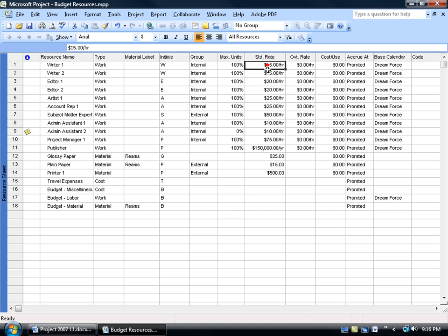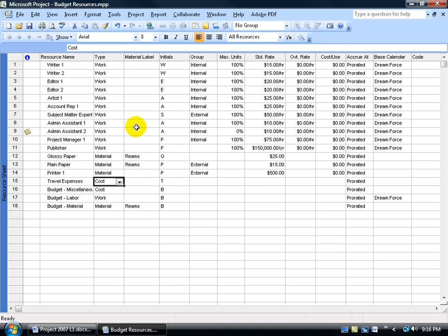Where I assign this resource to any task, they're always going to be at $15 an hour. The travel expense cost — if I'm traveling out to one city in one task, to another city in another, it's going to be different per task. So we've got all three of those covered. What we haven't covered yet is our budget resources — how much we are setting aside for the cost, the work, and the material resources.